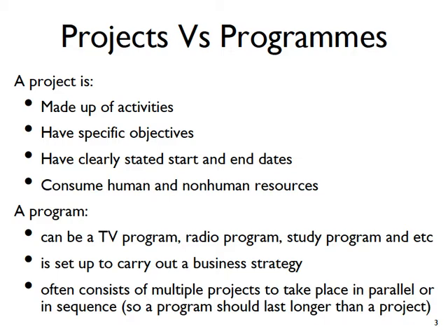One project is to hire 10 top people in the field, with the expertise, with the skills. That may be your project number one. Your project number two is to provide some training to the existing employees. And project number 3 may be to set up some quality procedures. So all these 3 small projects together may make up the quality program that you want to implement.